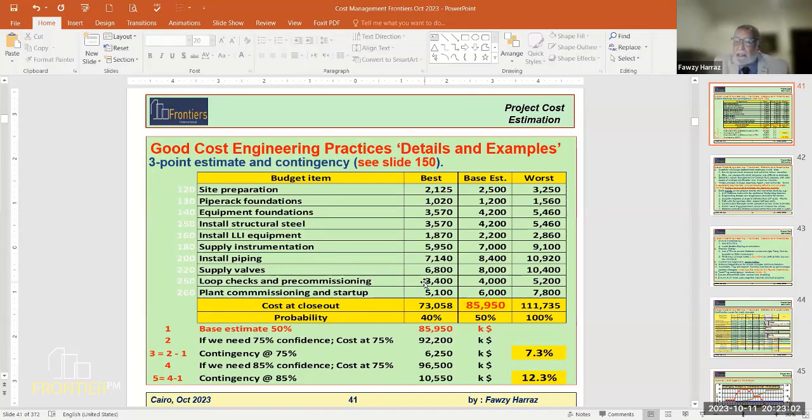the facilitator will ask, do we expect any market increases? No. Do we expect any exceptional weather conditions? No, not that much. So the contingency will be very limited on that item. Other small items, if you ask, yes, the market can fluctuate, yes, execution can have difficulties. So the contingency is based on the amount of risk associated with each item.